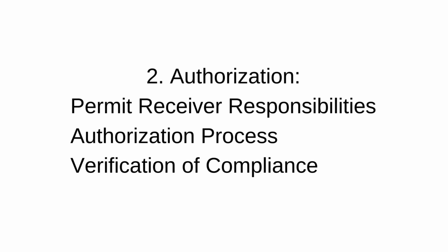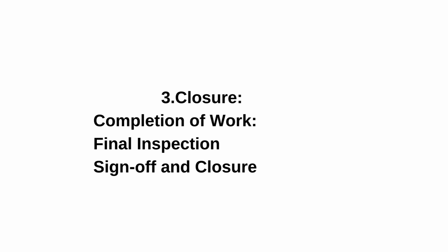The authorizing officer must verify that the permit conditions are met, necessary safety precautions are in place, and all personnel are adequately trained and equipped before authorizing work to proceed. Now, the third step is closure of permit.